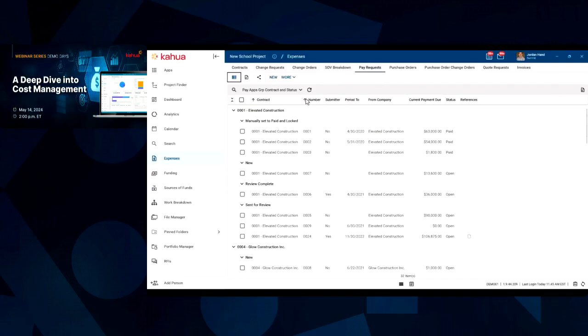This is where I can say, we have established sort of that pencil copy pay request. The contract was signed and agreed upon. The contractor has submitted to us their schedule of values. We've reviewed it. We've approved it. We accept this particular SOV to be the one we're going to move forward with.